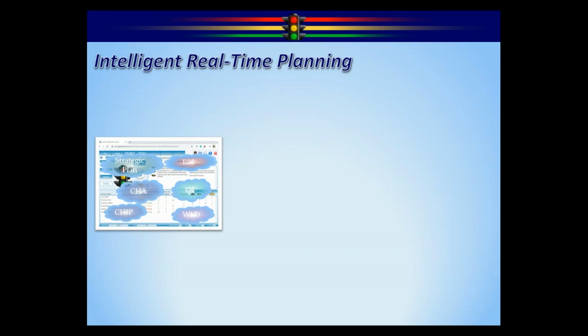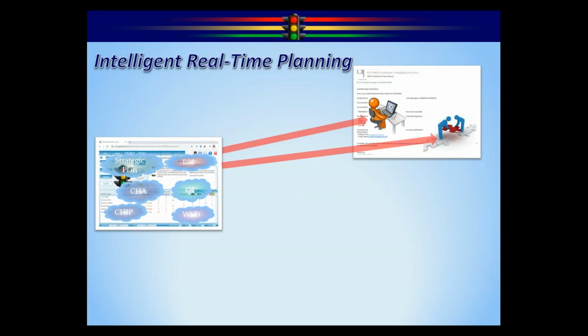On the first Monday of the month at 1 a.m., the system goes in and it looks at everybody that you've designated as an activity lead or an objective lead. And it asks 3 questions. Number 1, has this person been in the last 30 days and updated their stuff? Number 2, does this person have anything that's falling behind schedule? Number 3, does this person have anything that's overdue, past the ending date? If any of those is true, out go the emails. If none of them is true, no email goes out, no spam.